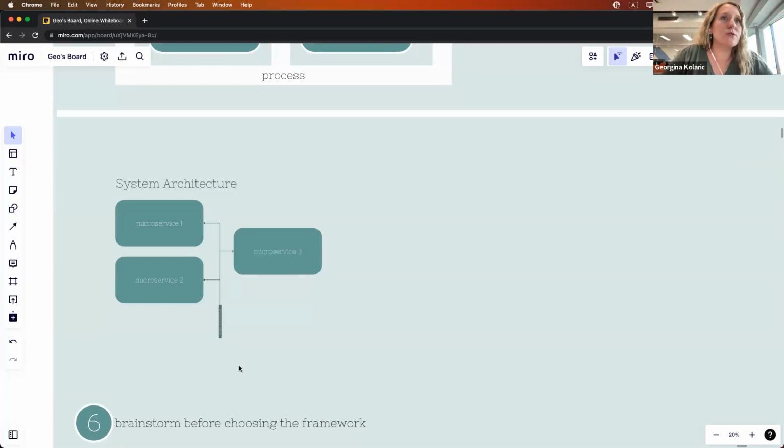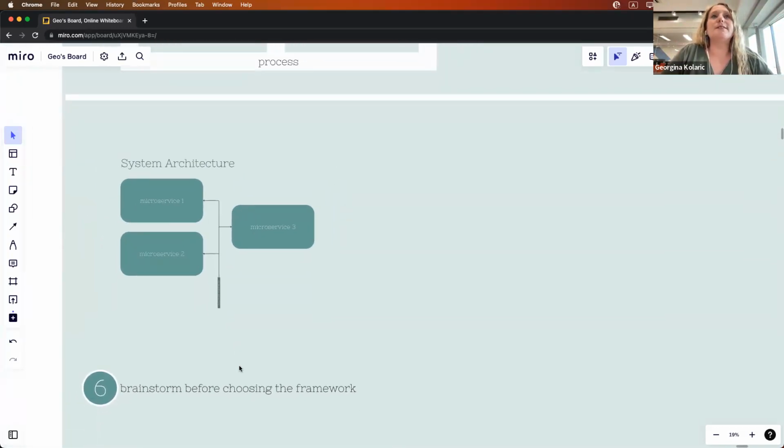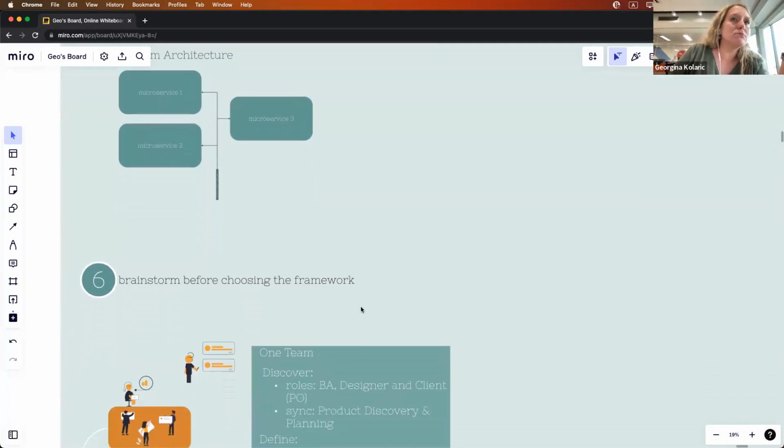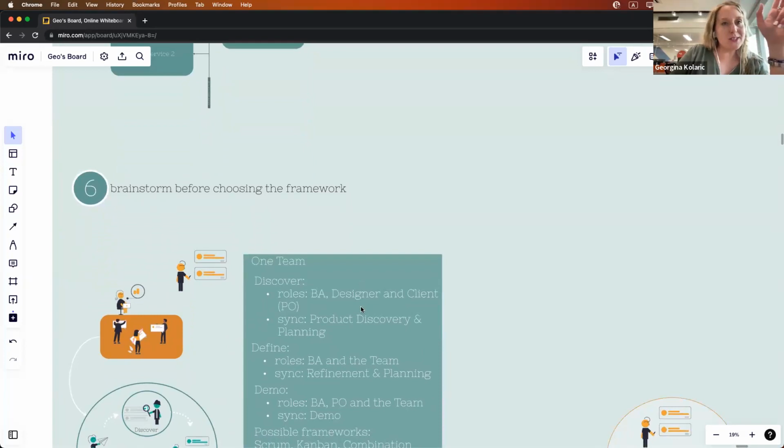They're communicating over some message service bus. And we now see, okay, if I have 3 microservices, I can have 3 teams. Then the client comes to you and says, I don't want to hire 3 teams. It's too much money. And I need to approach this in an agile way. I need to first deliver an MVP, for example the first service, then deliver the most lovable product, for example a second microservice, and then deliver the final product with all 3 microservices. And you can say, okay, let's organize them with one team. So I have 2 examples here, with one team and with 3 teams.